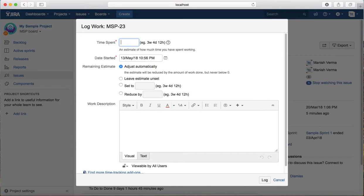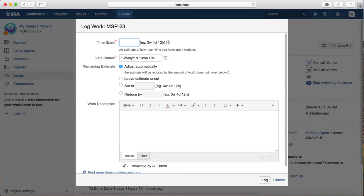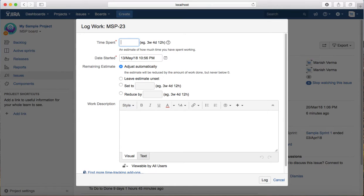The ideal thing to do in a project is, as soon as you are done working on the issue for that particular day, log all the hours you have spent that day. This will give you a clear burn down report for your project manager or scrum master and a clear view of that particular sprint.